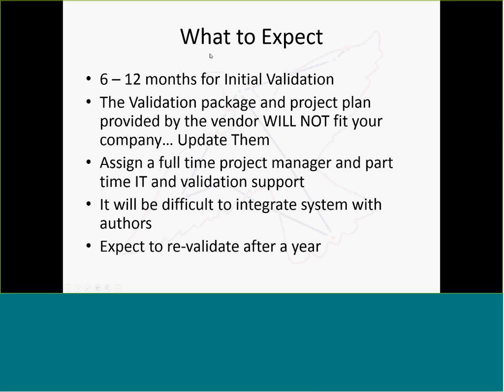It can be an internal third party that happens to have experience with that system, but it can be from the vendor. You need to use the vendor, and they will provide support, but you need someone on your side that can project for you. It is not just following the script that the vendor has created. With that, and 12 months is if you don't have that. And I've seen it go as long as 18 months.